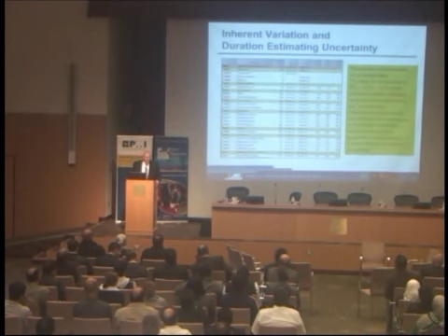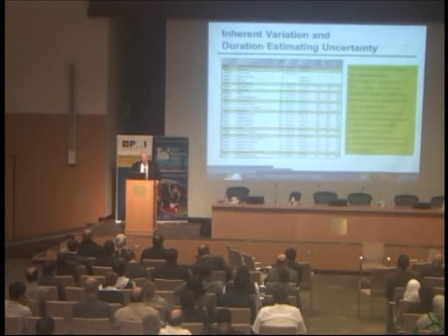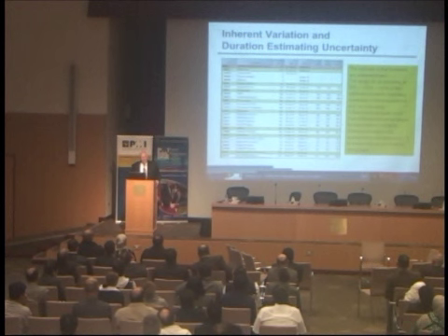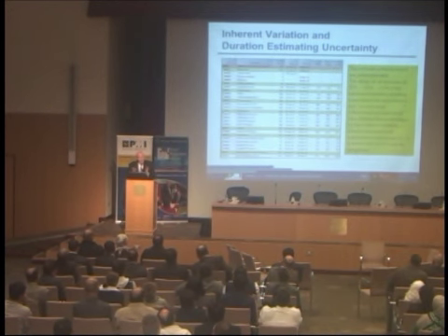Well, I've been commenting about not using three-point estimates, but I will tell you that there are still some reasons to use three-point estimates, namely to represent inherent variability. This is not the entire risk. This is just the inherent variability part.